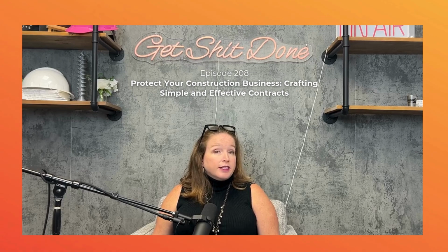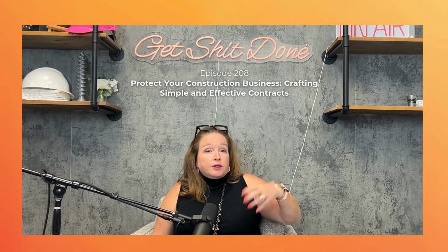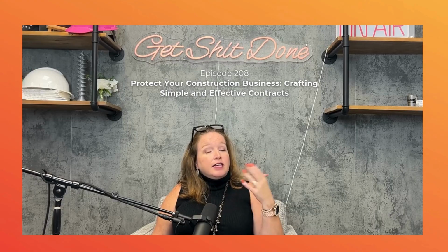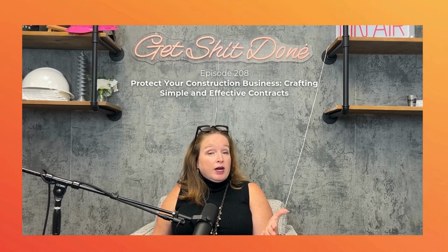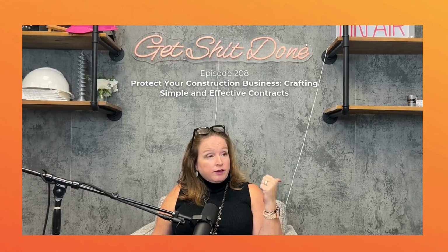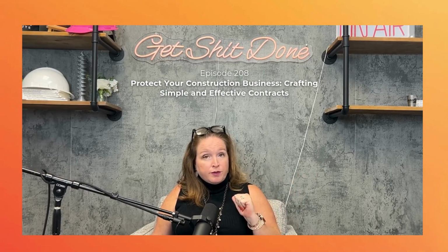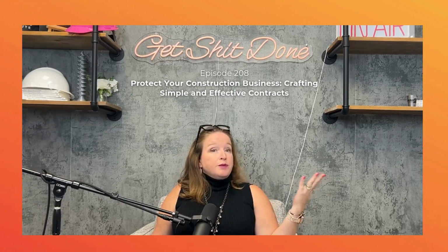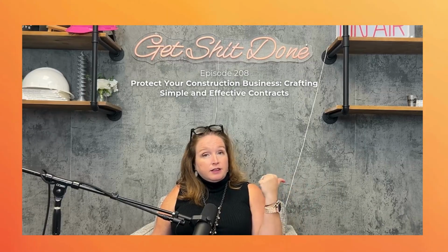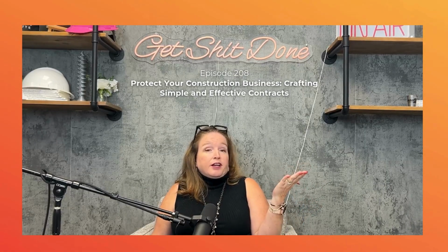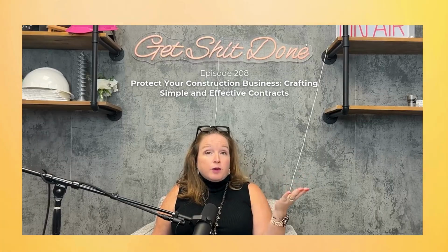So the first part of it in residential construction is letting the homeowner know that, hey, I'm an expert, but I can't see everything. Things might happen where it's going to increase the price, and here's how we're going to handle it. I'm going to dig in and uncover the shingles. We're going to find out how many spots on the roof are bad, and we're going to talk about how much it's going to cost to do that extra work. Or if I'm a remodel contractor and I dig into a wall and see that all of the electrical has to be redone because that's something I couldn't see from the outside, this is how we're going to handle that.